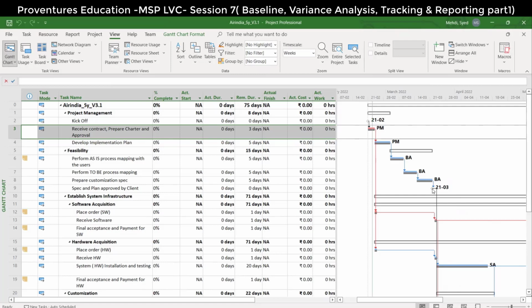In Microsoft Project, before you update anything, first you need to set the status date. As on which date we are updating is important. So you tell the progress as on one of the dates. As on end of February, 30%. That's the status.